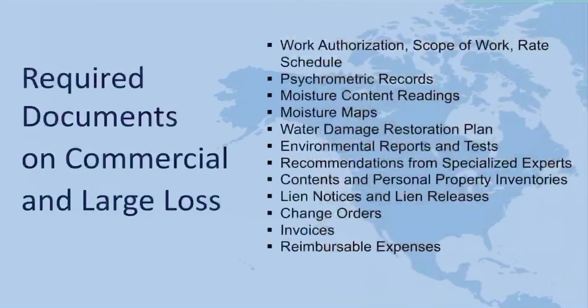So you have to make your communication in such a manner they can understand those. You need moisture content readings. You need moisture maps to show where your moisture content readings relate to the building, which gives documentation and proof of why you have drying equipment in that general area of the building. So you would need to keep up with all that.